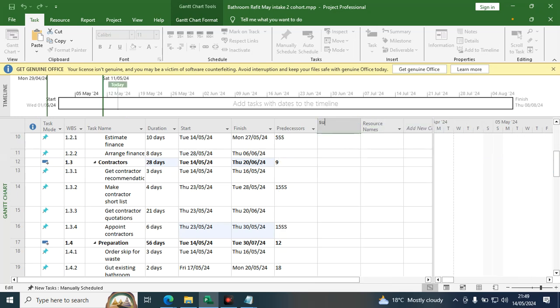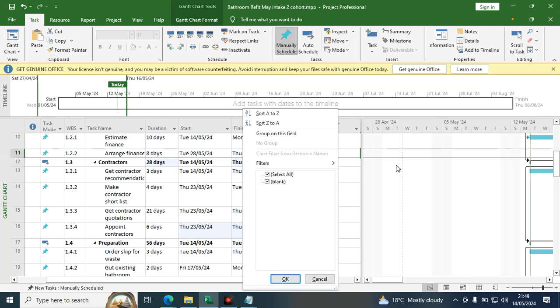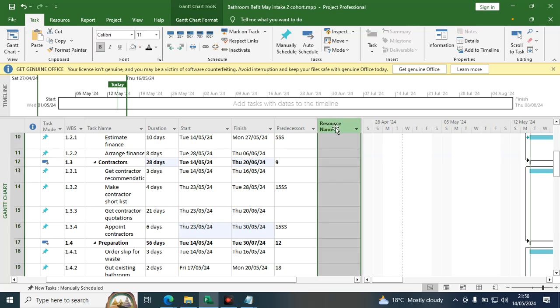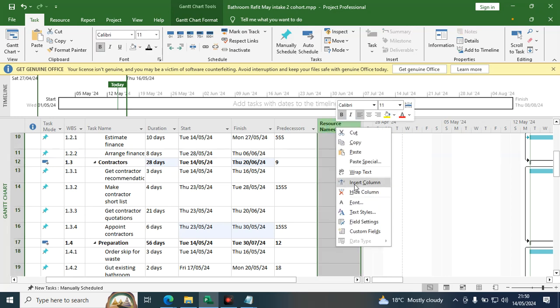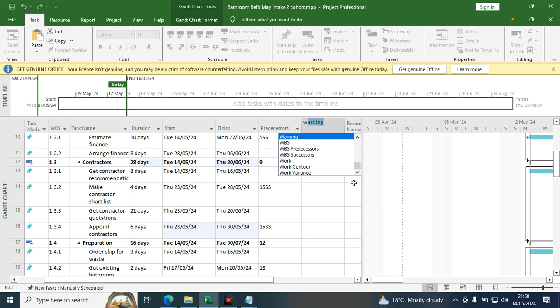They are supposed to pick like that. Remember, I did not add anything here. If your predecessor column is okay, then the predecessor column has everything. The successor column, normally you insert it and it will pick automatically what has been in the predecessor, because the successor depends on what you have here.